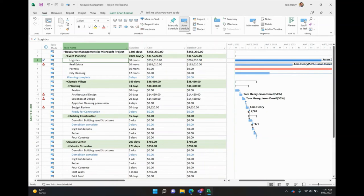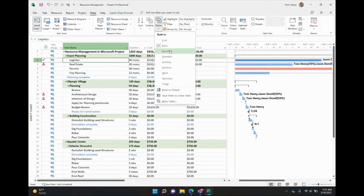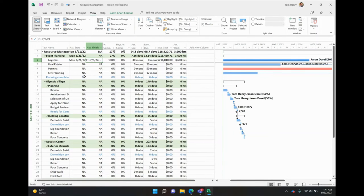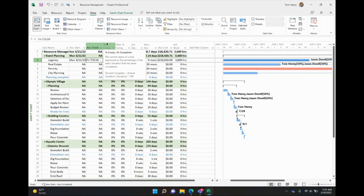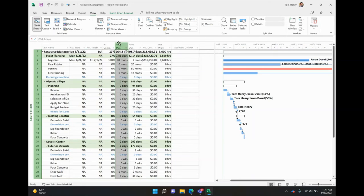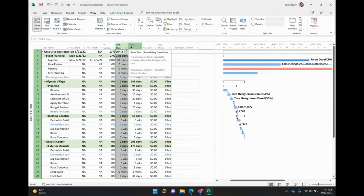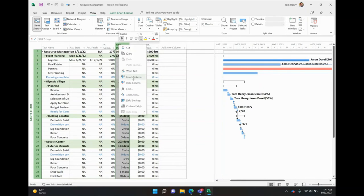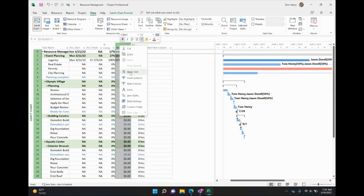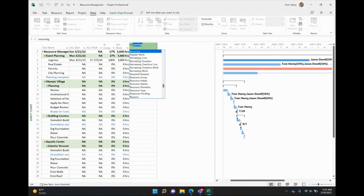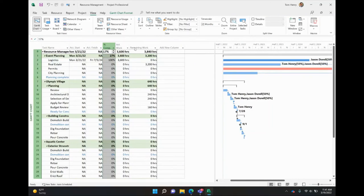If you want extra granularity, I'd recommend the second method, which is actual work and remaining work. To do that, we come into the view ribbon and I'm going to actually switch the table to the tracking table. This table is really nice. It shows you all the different methods here, different fields that you can use so you can make it your own. The ones I'm going to have is actual start, actual finish, percent complete. We don't need the physical percent complete. That's if you're doing own value, actual duration, remaining duration, actual work, remaining work. I like to just actually track actual work and remaining work. The duration is slightly different to that. And the actual cost will be something that I don't really care about at this point. So my method is actual start, actual finish, actual work, and then remaining work.